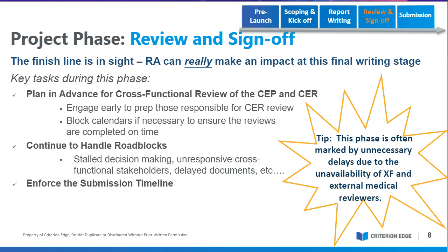I'll say one more thing about the review. We have occasionally been asked, can't we just sit down and all hold hands together, have the whole cross-functional team on, and do a review all at the same time. We get that. We sometimes do that for comment resolution or even review resolution, but almost never with a CER. They're simply too large and too complex. Doing a review round and hashing out issues in a sit-down meeting would put six people on a six-hour call, and then we probably still wouldn't get it done.